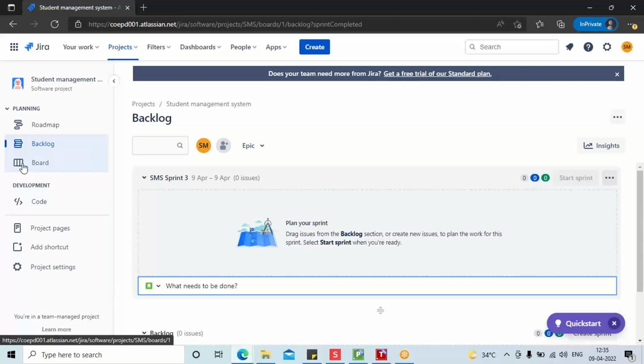You put the number 16. And tomorrow is a holiday. We have estimated 16 today. So will this 16 skip tomorrow's 8 hours? Yes. Only 16 productive hours you will put. It doesn't care how many days you have. You can work 16 days also, 1 hour every day. Who cares? As long as you are spending 16 hours, I'm okay.